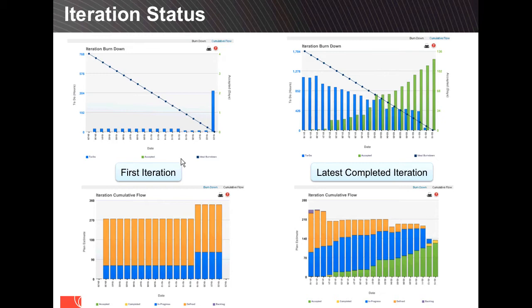If you move stories in from an earlier iteration, typically you're going to start with that to-do line closer to the initial first line. In this case, it would be like 1,700. But we're only seeing that if the teams are actually planning the number of hours for every single story at the beginning of the sprint. Yeah, actually, that's a good point.